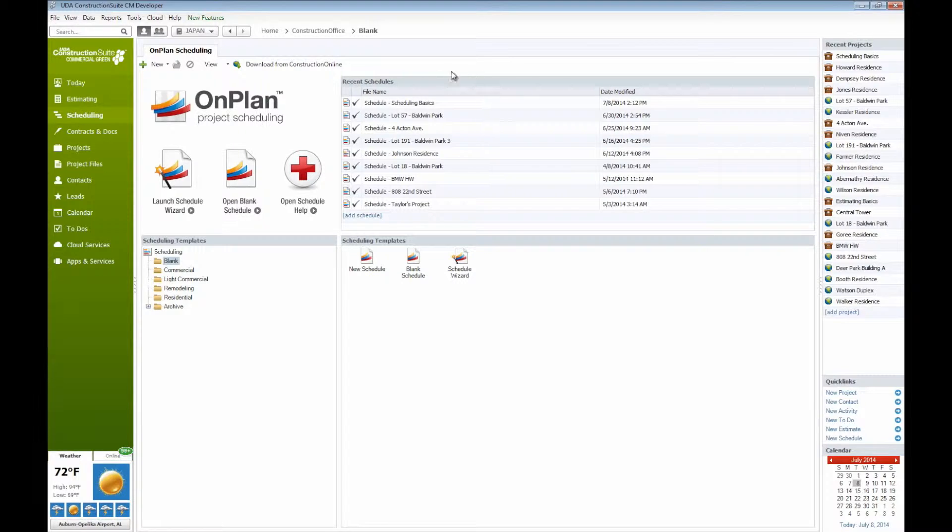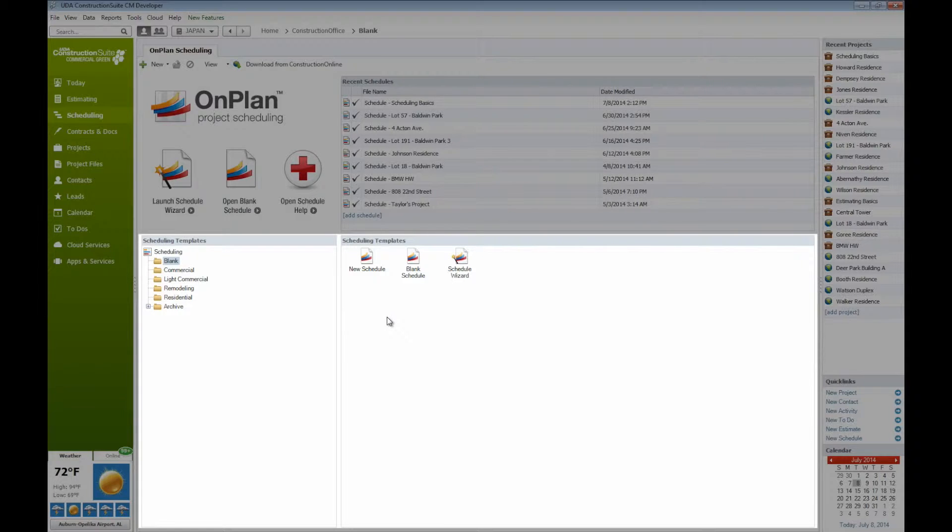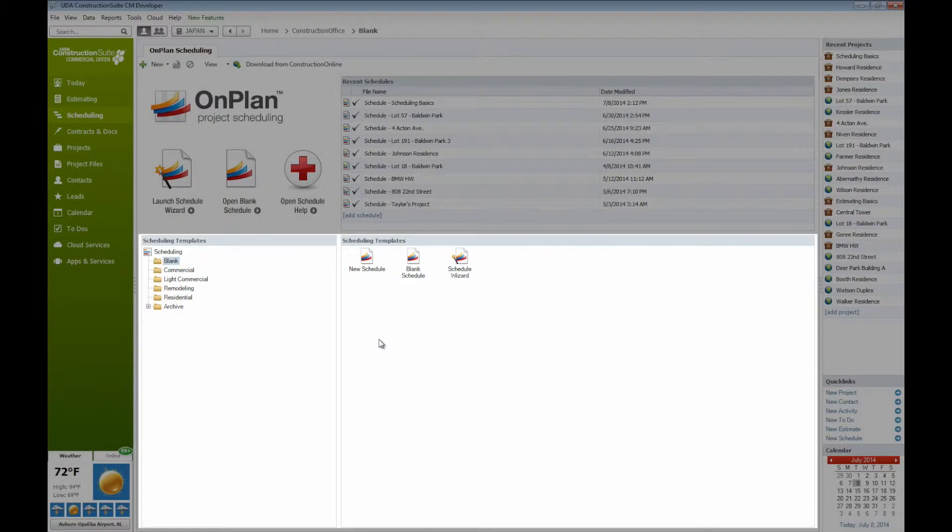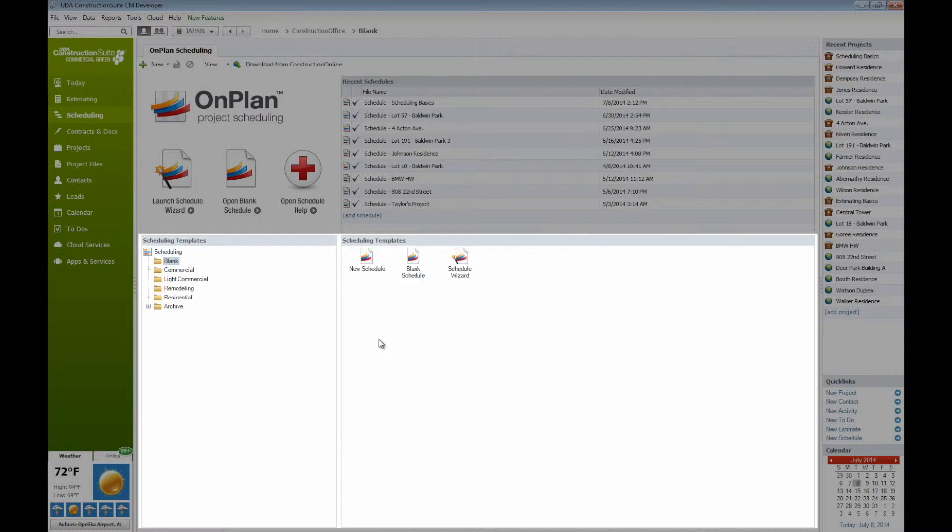Beneath the recent schedules window here, we'll find all of our scheduling templates. These are going to be templates that either we have provided you with ourselves or maybe even some that you've created on your own. One of the huge benefits of Construction Suite is that you can take a full schedule that you have currently been working on, one that you have pulled all the way through through completion, and turn around and use that same scheduling framework as a template for future projects.